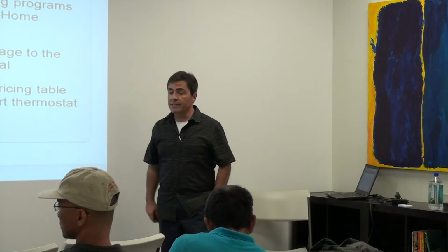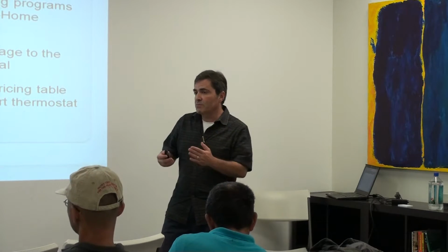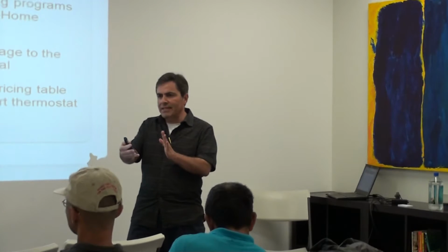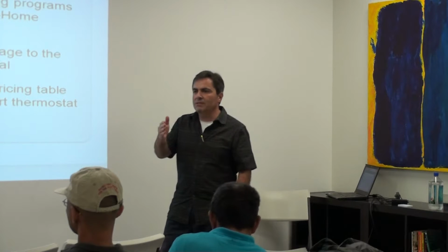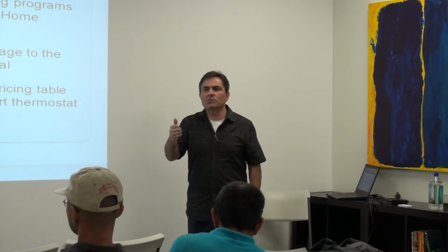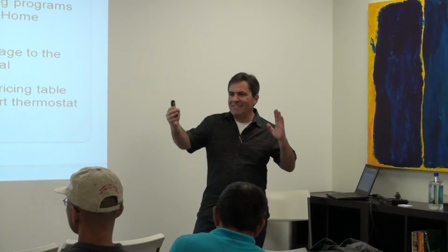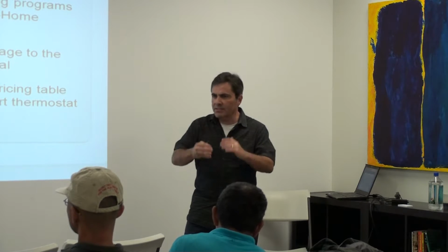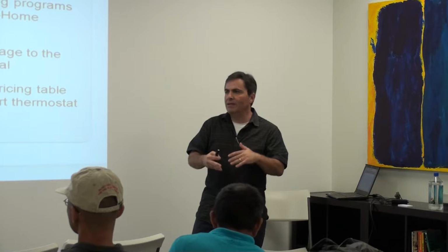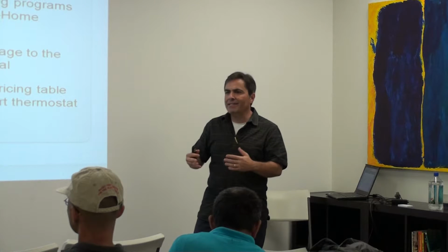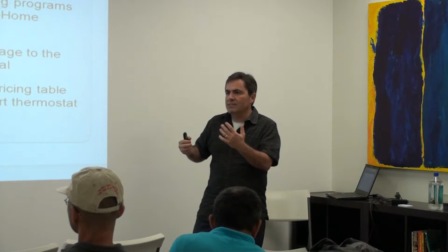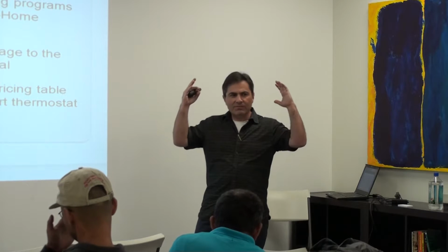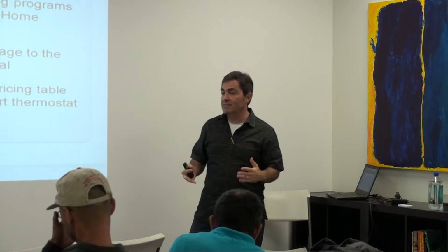And you guys see something? Yeah. So we have a design, build, and test. We want to be able to get something to testing, right? A common failure pattern that happens with Agile is if you have 10 days, the first 8 days, people are pounding on the keyboard, coding. And on day 8, this massive truck backs up on the tester and says, okay, here, test this. And they have a massive amount of things to test, not enough time.